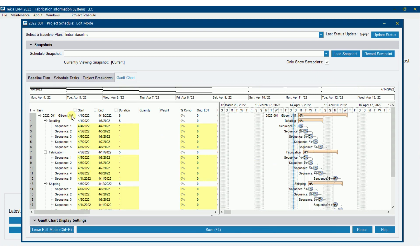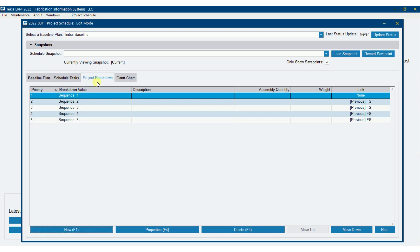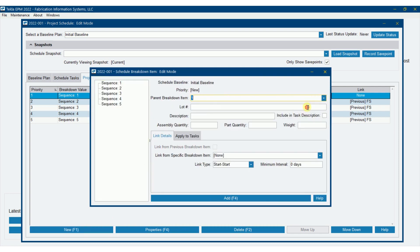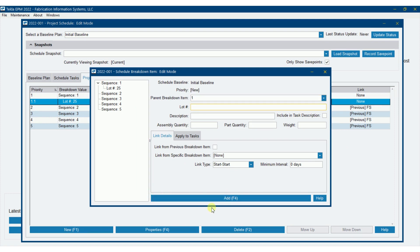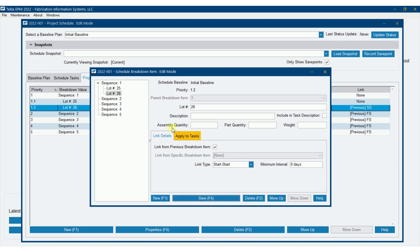We have our basic schedule set up. Now I'll show you how to add lots. If I click new and set the parent to sequence 1, notice how the type changes from 'sequence' to 'lot' — it knows I'm linking back to sequence 1 as the parent. I'll add lot 25, and then lot 26, linking 25 as previous with a finish-start relationship, so lot 25 must finish before lot 26 starts. Save. You can very easily put lots underneath sequences.